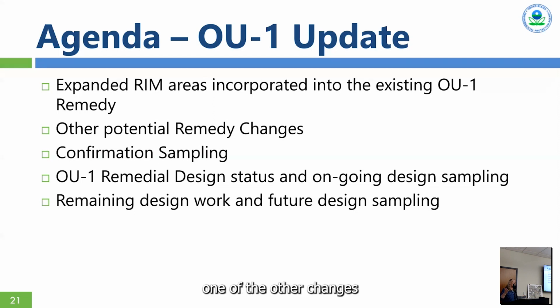So these are some of the things we're considering. One of the other changes associated with that is potentially using an on-site lab. We have required an on-site lab because we wanted to get the data back as quickly as possible when the excavations were open. That's not going to be necessary now because we're potentially collecting the data up front. These are all things that are being considered, not finalized yet. Tom will go into this more. I wanted to make sure we talked about those changes so that people aren't surprised by them. We want to make people aware that there are modifications to the remedy.